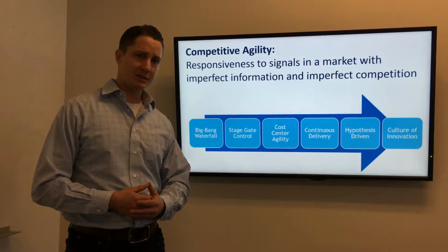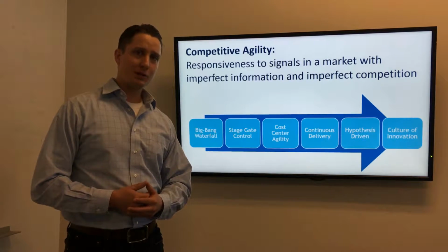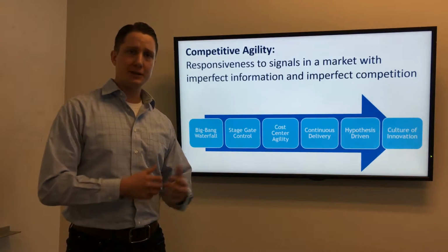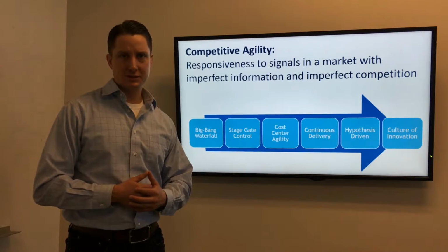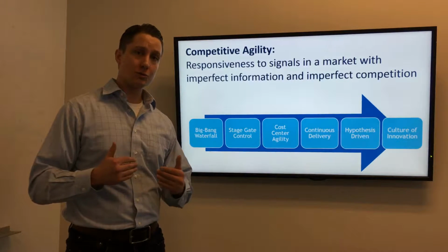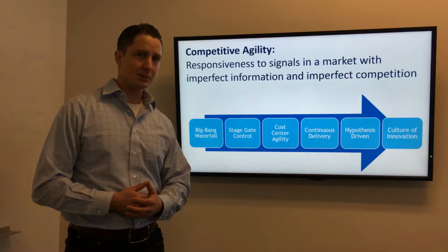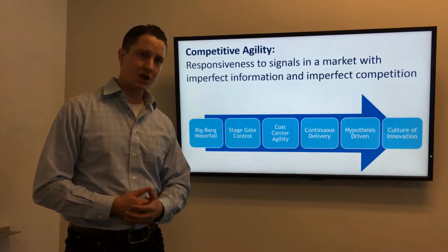The other thing that it does, typically, is control work in progress. Work in progress, unlike in Kanban, gets controlled in stage gate control with the funding horizon. If you can only fund up to a certain number of quarters or years through the stage gate system, then the amount of work in progress for any given system is also held in check.